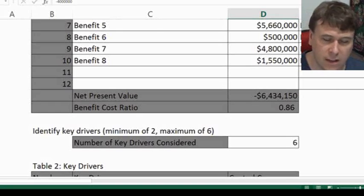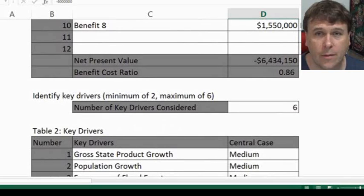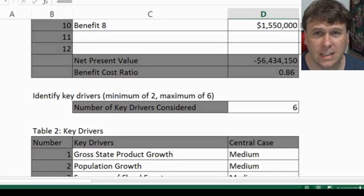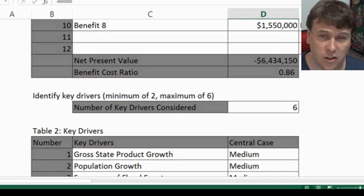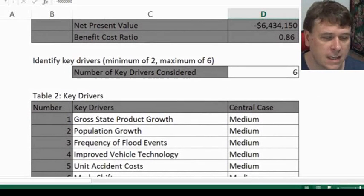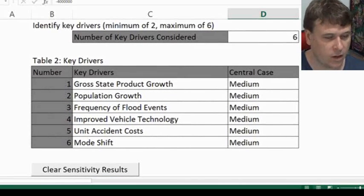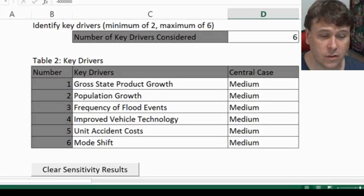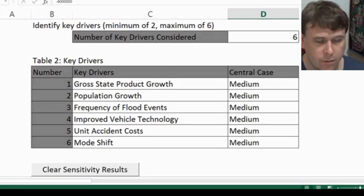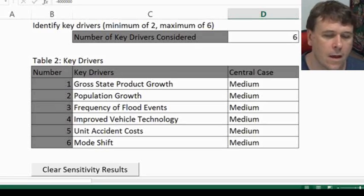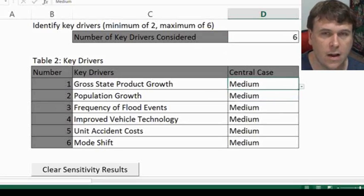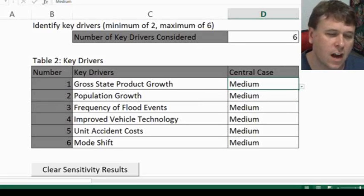How many key drivers do you have? These key drivers are important when you come to sensitivity testing because they affect the parameters that you actually change when you run your analysis. We've got a maximum of six and a minimum of two. I do recommend having more, but six is about as far as I got with this model. You may also want to combine some of your key drivers together. So we've got things like gross state product, population growth, frequency of flood events — I think this would be a road project — potentially improved technology, mode shift between different modes, whether between cars or buses.